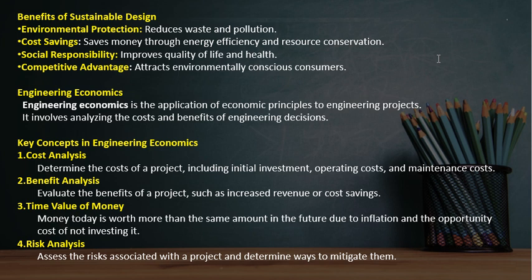Now, another factor for which I need engineering economics specifically is the factor of time. If I have 10 BD today, will it be the same after 10 years? No, right? My project is for 20 years, so I have to take the cost of now and see what will be its value in the future. So this is called the time value of money.